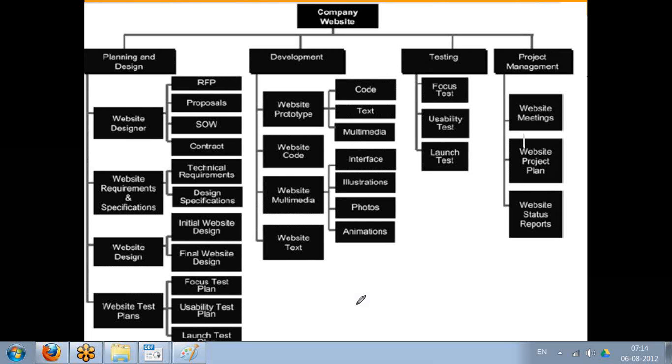So if I go there once in 3 days or 4 days, it's fine. So for a large project, your work packages can be towards 80 hours. For a small project, it can be towards 8 hours, not less than 8, because you will end up doing micromanagement. So that is 8/80 rule.